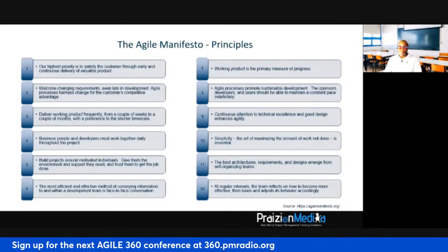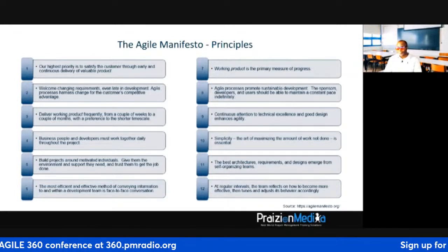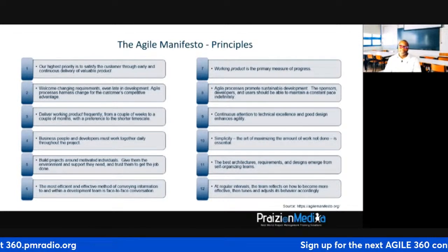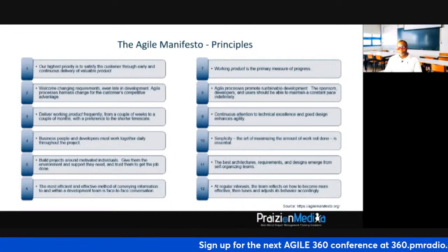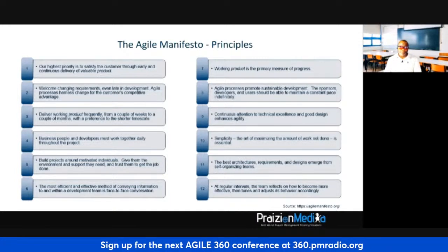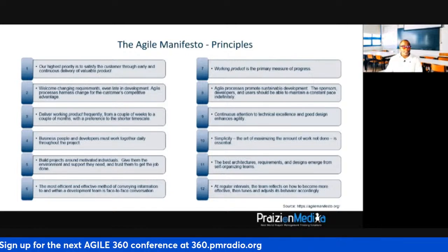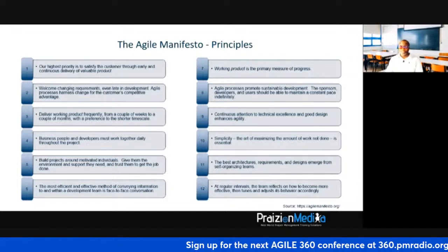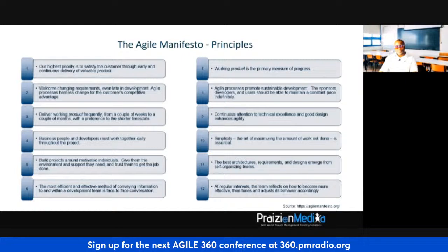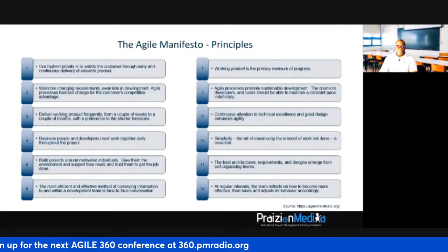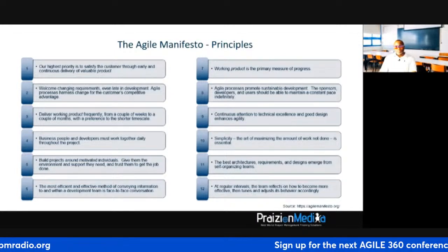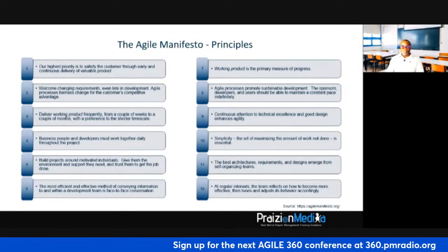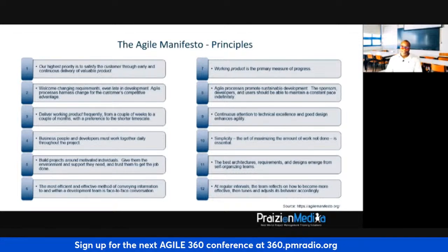So a lot of times the retrospective would happen at the end of a sprint. But in the Agile community, very recently, we have begun to embrace the idea of a retrospective not having to wait until the end of a sprint. You could have a retrospective at any time the team feels they need to. So instead of waiting until the end of the sprint before you make a correction, if you wanted to make a correction right now, you could. But it has to, of course, be with reflection. And it's not just a one-person thing, it's a team thing.